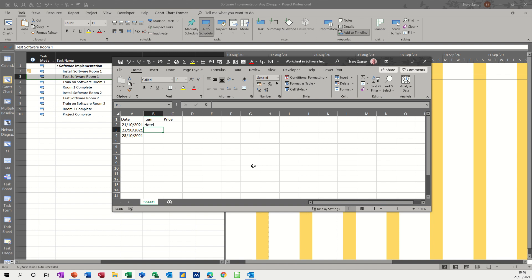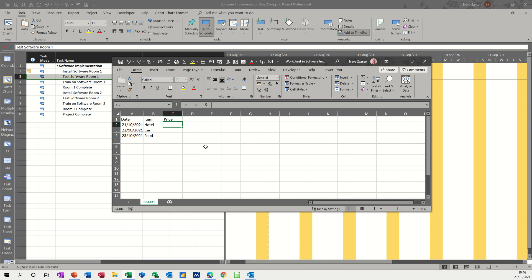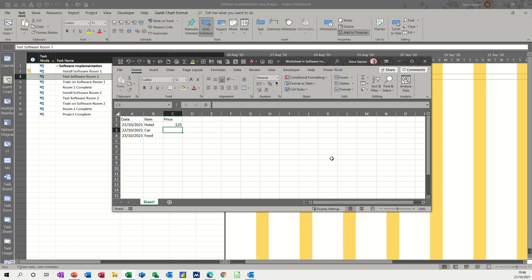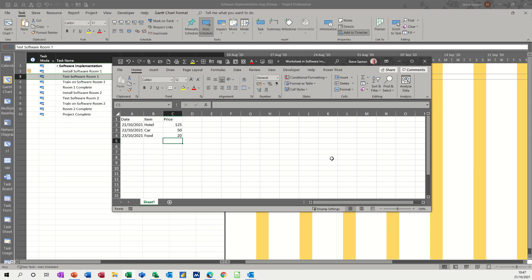I like to do this rather than using the cost resource, because when you complete a task, if you've used a cost resource, it doesn't actually spend that money, so it sits there as money remaining in the budget. Whereas if you just put whatever the total of this is into a fixed cost in the resource, that does get spent when the resource is complete. So let's just put some prices in here: £125 for the hotel, £50 for the fuel, and £20 for food.